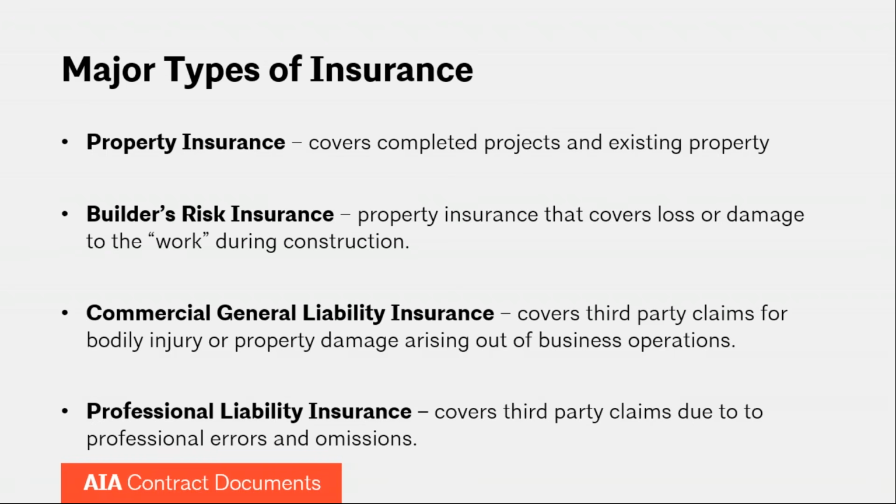Builder's risk insurance is a special type of property insurance that covers loss or damage to the work during construction. So this is often, again, procured by owners, but if you are using our insurance exhibit, it is possible to change that by checking a box to have the contractor buy the builder's risk insurance and get reimbursed from the owner. Sometimes contractors can get better rates on builder's risk.